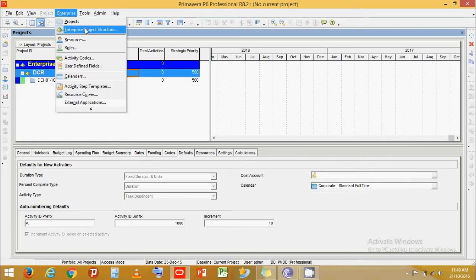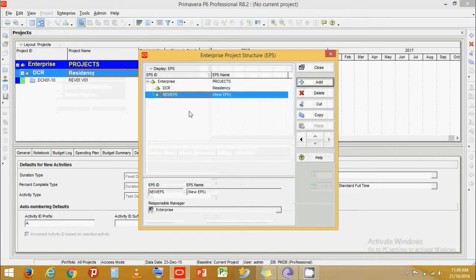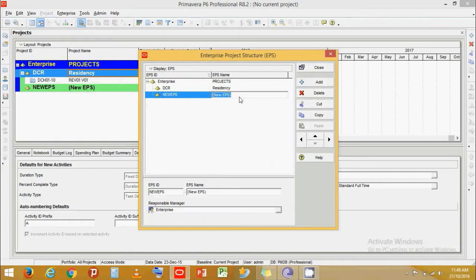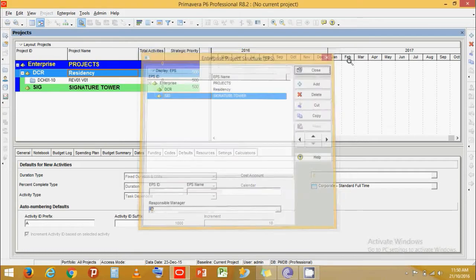Create an EPS first for our project. Click on Add. I am going to name the project as Signature Tower. Let's give it an ID of SIG. Then click Close.